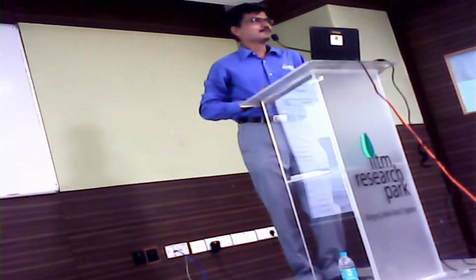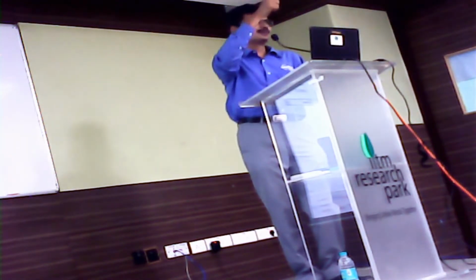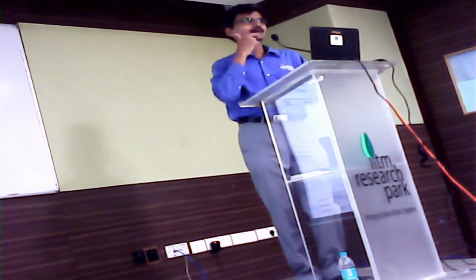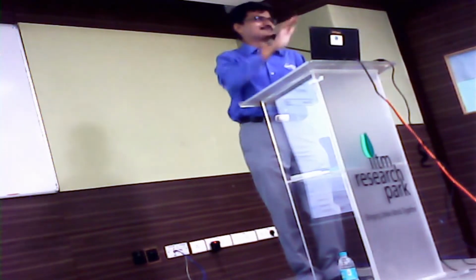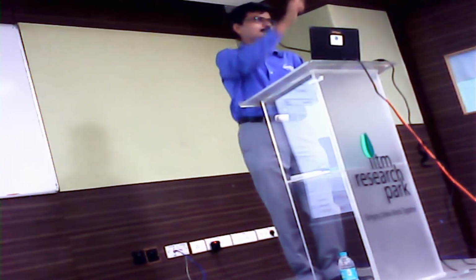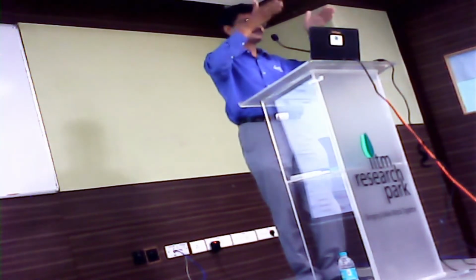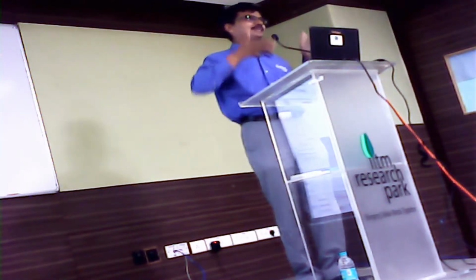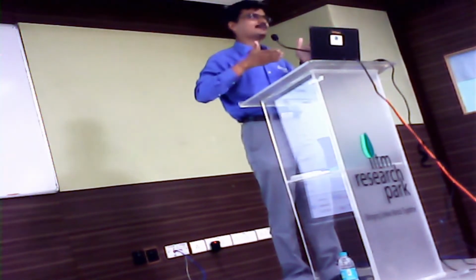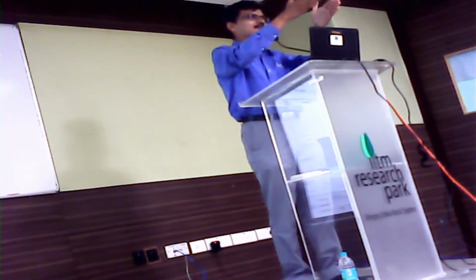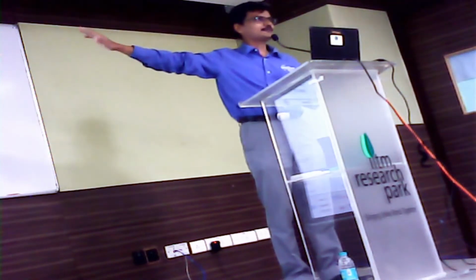And they have different leave or holidays, whatever. You can do it, sir. I'll just demonstrate that. The resource calendar is always respected when it schedules work for them. Just remember that point. So if I give you 8 hours of work and I also give myself 8 hours of work on the same task, my 8 hours will be scheduled as per my resource calendar, which means I may take either longer or shorter to complete it. Whereas you will take, as per your resource calendar, the dates that are going to be scheduled. I'll just give you a small idea of how it works.